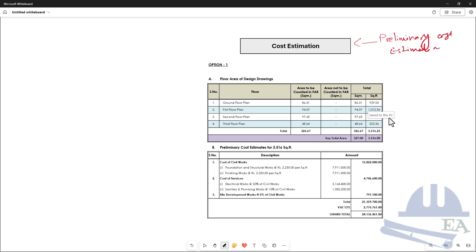Based on the preliminary floor plans that you have prepared, you can get the area of each floor. For example, the ground floor plan area is 86.31 square meters. Similarly, the first floor, second floor, and third floor areas are calculated, and the total area is 326.67 square meters. You can also get this in square feet by multiplying with the factor 10.76.